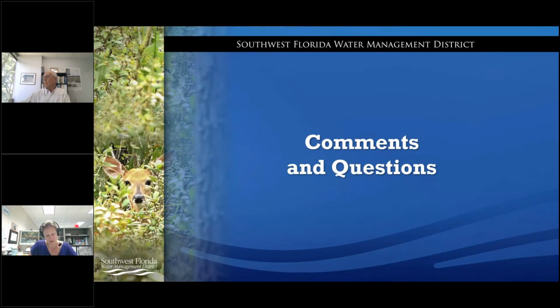Sure. And then just the other one of note, now we'll be looking for projects where the design is already completed. We won't be accepting ones that don't have the design yet. Is that correct? So for the design, we're really just looking for a preliminary design. It could be conceptual. Depending on the type of project and your background, maybe as an engineer, whether that's 15 or 30%, just look at the criteria in the CFI guidelines, and you'll see those bullet points that need to be met to show that it does qualify as a preliminary design. We tried to get away from a percent design and focus more on meeting these bullet points. That's what's going to qualify as a preliminary design. So you do need to have a preliminary design, good schedule and cost estimates so that we can review the project and make a decision. Perfect.